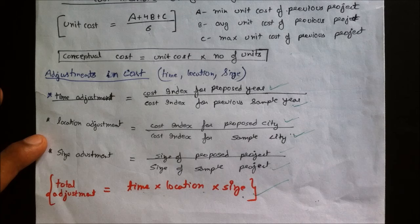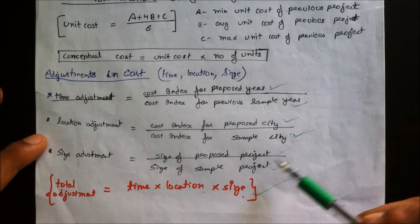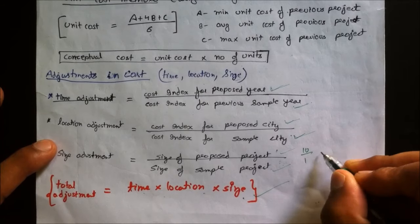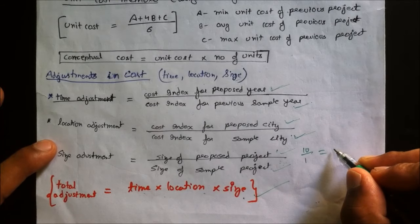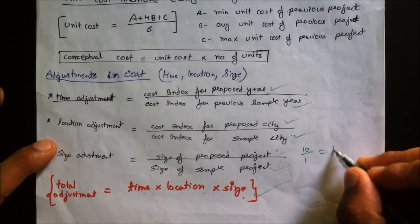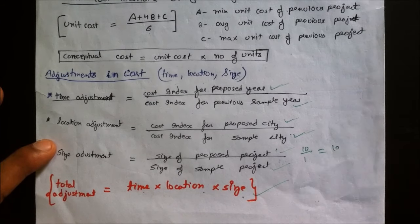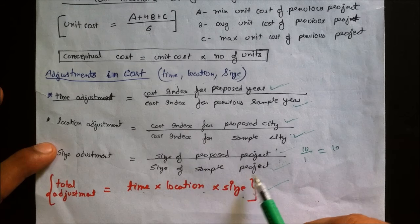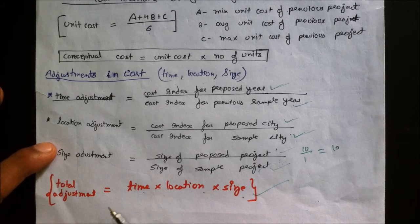For size adjustment, if we built a 1-storey building and now want a 10-storey building, the size adjustment factor is 10/1 = 10. It is calculated as the size of the proposed project divided by the size of the sample project. The total adjustment is the product of time adjustment, location adjustment, and size adjustment.